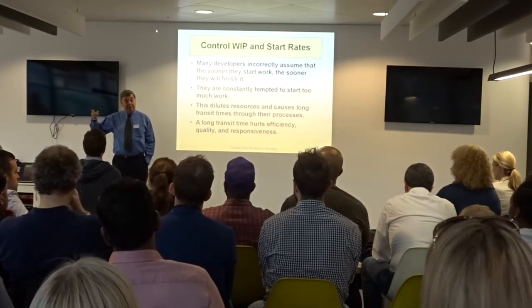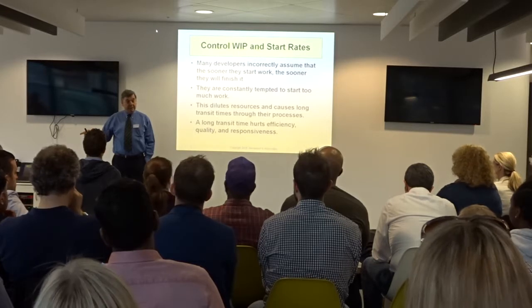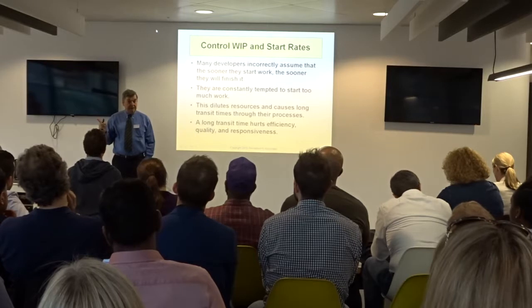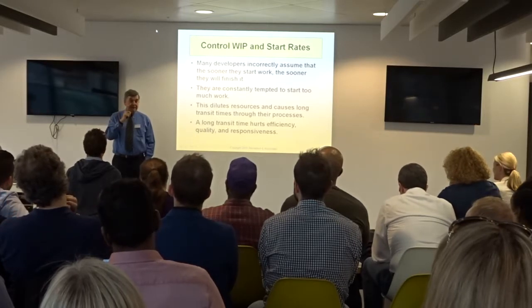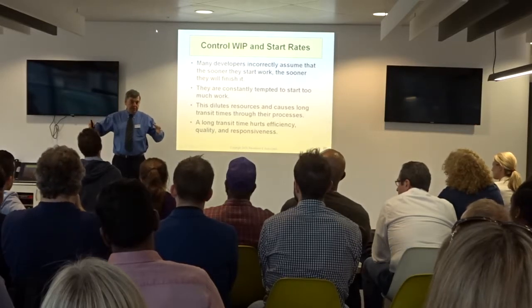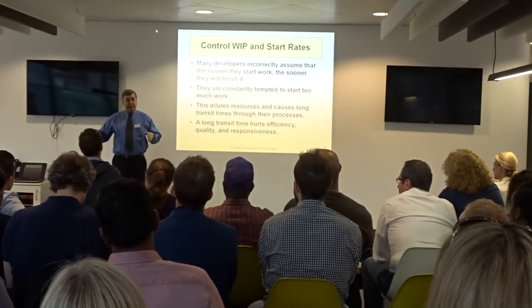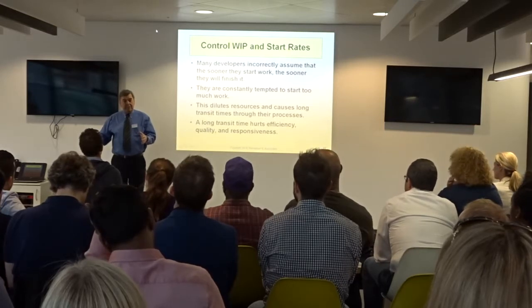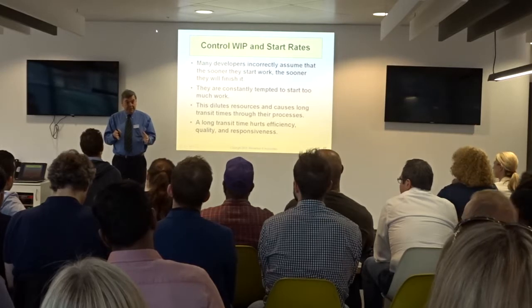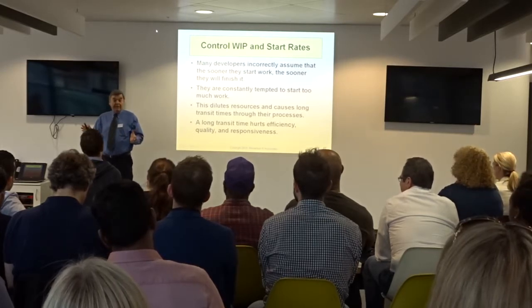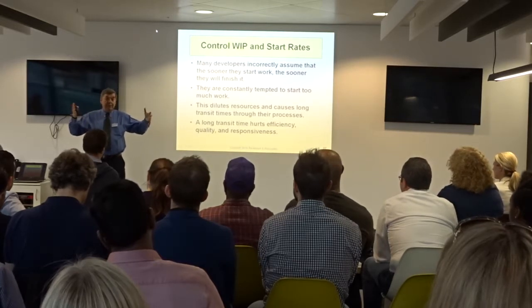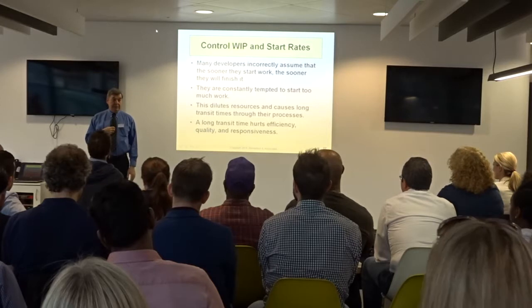And they said, there's something wrong with this process. So they still did the triage decision very quickly because you had to find the high severity stuff. But they did not dispatch everything immediately. They said, we're going to control the number of bugs we're working on at a time. Anytime we fix a bug, we never let another bug in the system. By controlling the amount of WIP they had in the process, they were controlling the cycle time. And controlling the cycle time meant that they didn't have these slow-moving projects that would become obsolete in the amount of time they sat within the system.